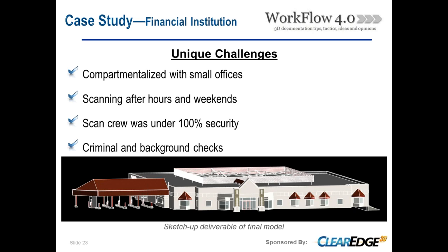So this project posed some unique challenges. As they indicated, it was a compartmentalized facility, and we'll see that here in a second. But what also made it unique was that since it was an operational office building with some high security assets in there, all the scanning had to be done after hours and over the weekends.